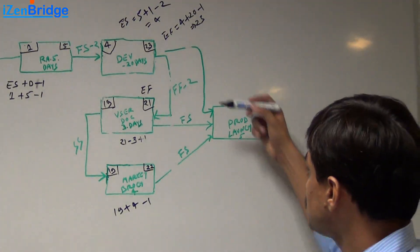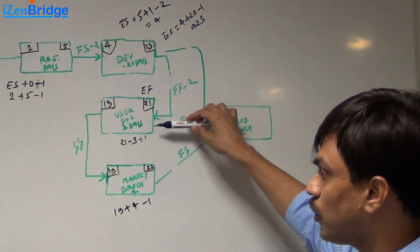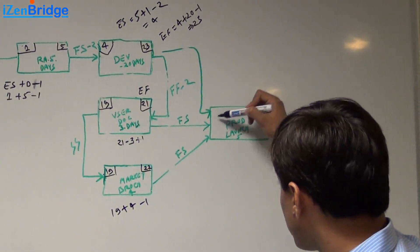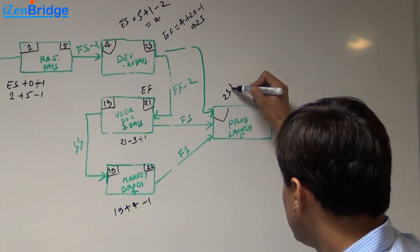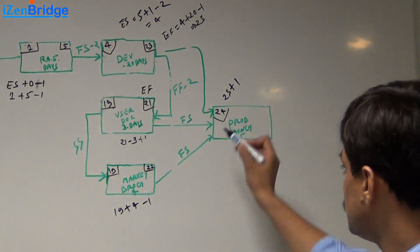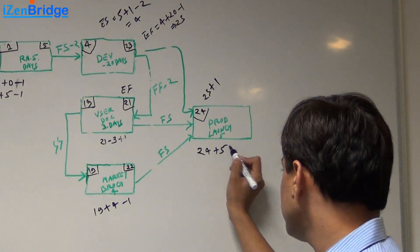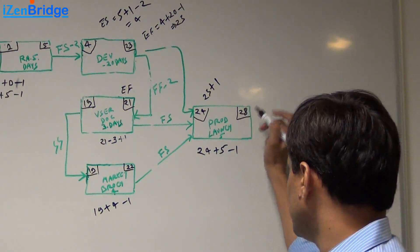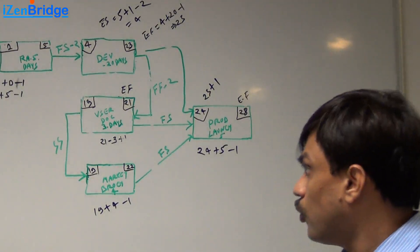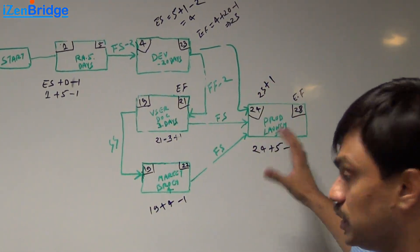The product launch is dependent on development, user documentation, and marketing brochure. The maximum finish among these three is day 23, so the early start of product launch is 23 plus 1, which is day 24. With a duration of 5 days, the early finish is 24 plus 5 minus 1, making it day 28. We have now calculated the early start and early finish of all activities.